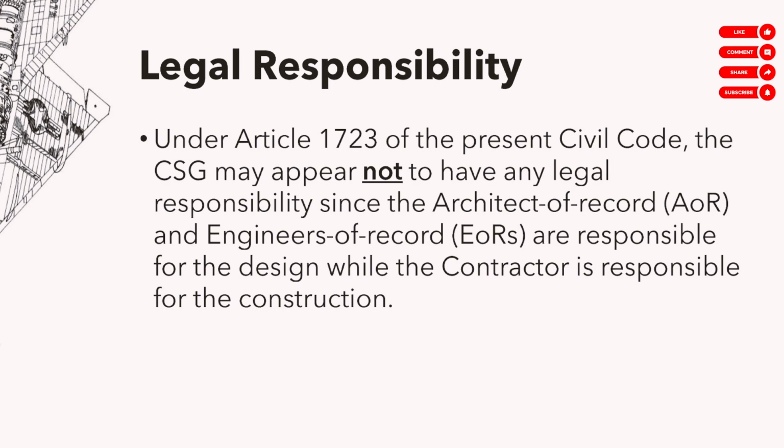At sabi ng SPP natin, under Article 1723 of the Civil Code, the CSG or the full-time supervisor may appear not to have any legal responsibility kasi the designers answer for the design and the contractor daw answers for the constructions. Pag tinanong ka, what do you think? Do you think may civil liability ang CSG or a full-time supervisor under the Civil Code? My suggested answer is no. Why? Because nasa SPP yan.